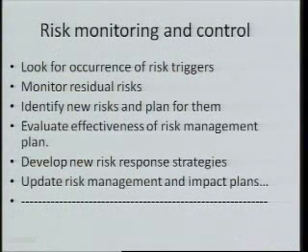The third thing that I need to do is identify new risks and plan for them. Again, if I come across such a residual risk, I have to plan for that again. And that is why, if you look at the diagram that I had shown you earlier, from the monitoring and control phase, the arrow goes up to the plan phase.